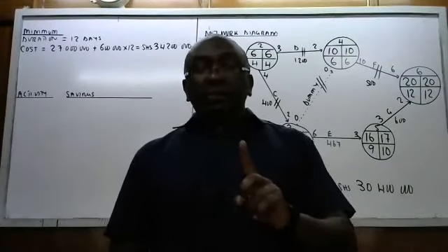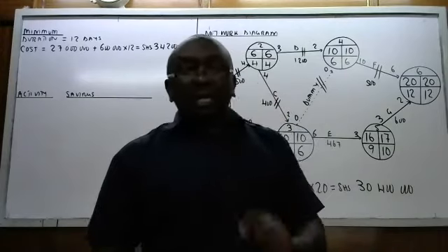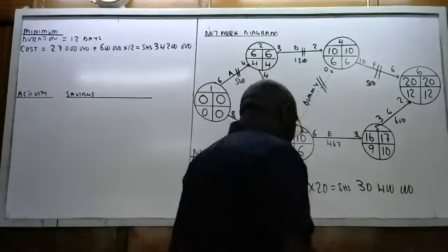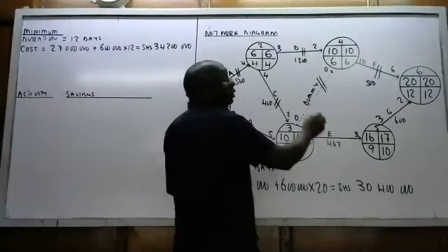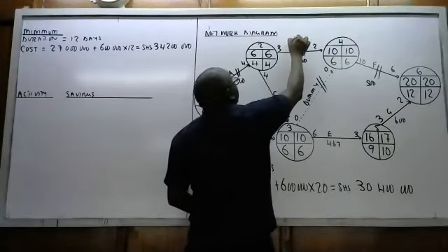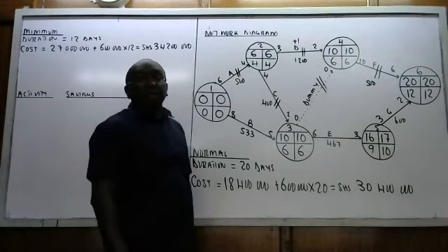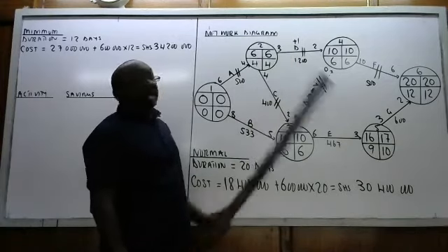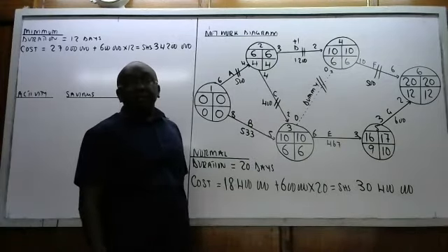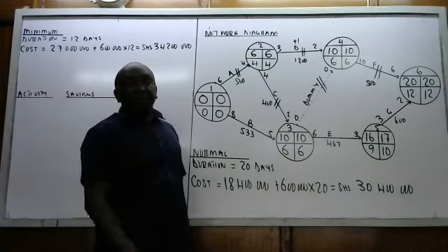So it is D. So that means D, number 1, should be returned back. So go back here and put +1. We put +1 because it has been denied 1 day. So when you add 1, you check the implication.